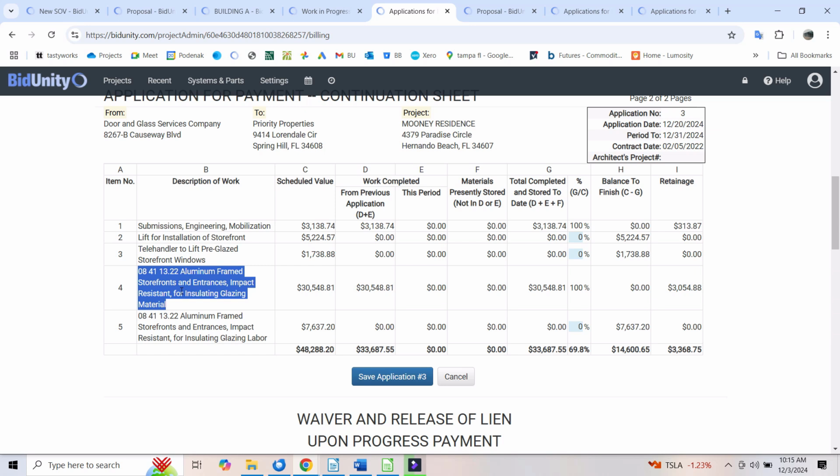We had to go to arbitration, and the arbitrator looked at the schedule of values. The arbitrator is expecting that Doran Glass would have structured its schedule of values in a way that reflects the value of what Doran Glass was going to be doing on the job. And so the arbitrator's analysis included, okay, what's line item 1? Did you hire an engineer? Well, how much of this $3,100 did you allocate to spending on the engineer that you didn't hire? And we can give that money back to them.